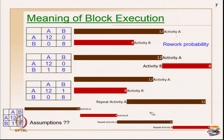Those assumptions you have to make in your model. Now if I put 1 for both relationships - every time A repeats B repeats, and every time B repeats A also repeats. What happens to this network? The model will never stop, because I am executing activity A then activity B sequentially, and as soon as B repeats A also repeats (100% probability), and as soon as A repeats B also repeats (100% probability). So A and B keep repeating endlessly.